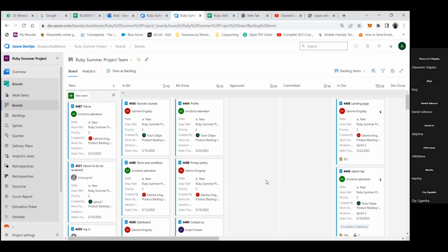Let the development work and the manual test that has been done on that particular story go on, and then the duplicate that you've created is what goes back into your backlog, to go back into the sprint. Oh, sorry, not for the developer, because the developer's work has been completed, but for the QA to carry out automation on it.